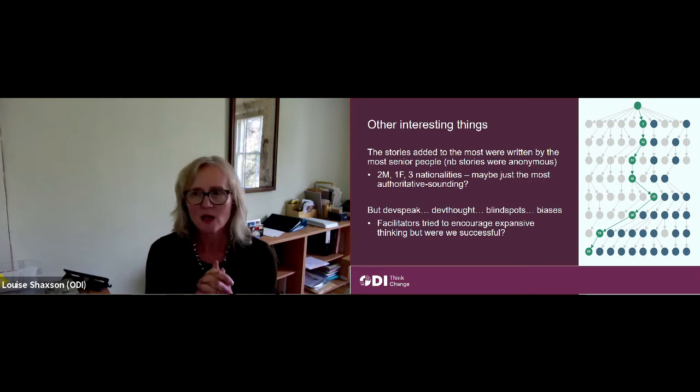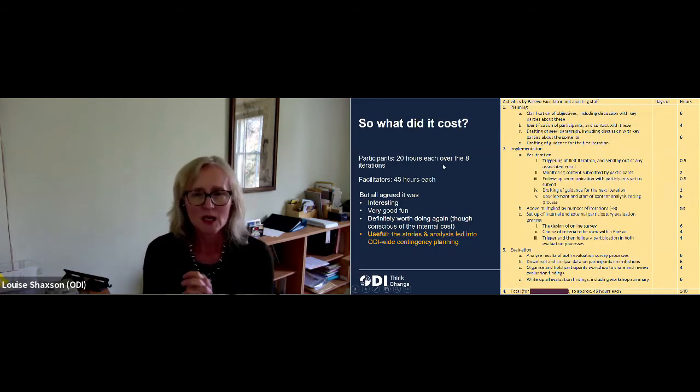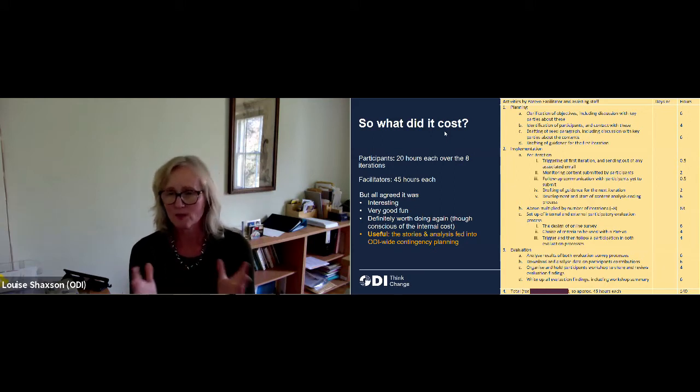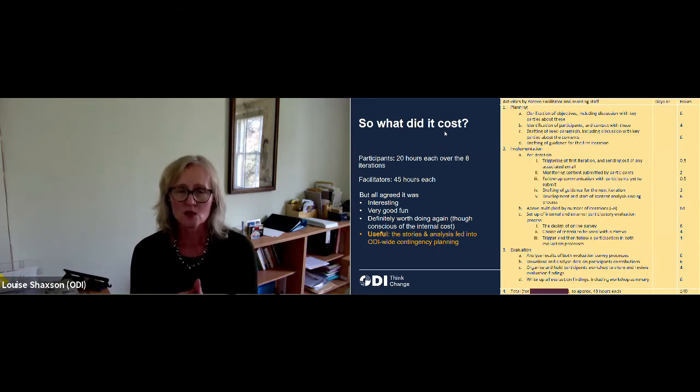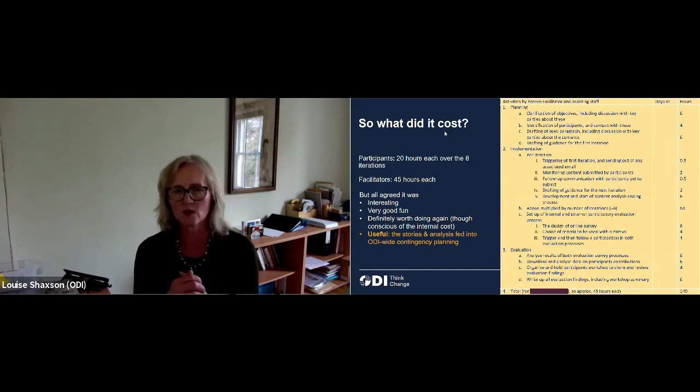So my final slide, I think I'm okay for time, Vicky. I'll take one minute. It's just to show you, we got people to record their time on timesheets, so we've got a very detailed analysis of what it cost. It's 20 hours each over the 8 iterations. Maybe because we're ODI researchers, people took a lot longer than 30 minutes to read the stories, read what had been written before, and then write their own story.